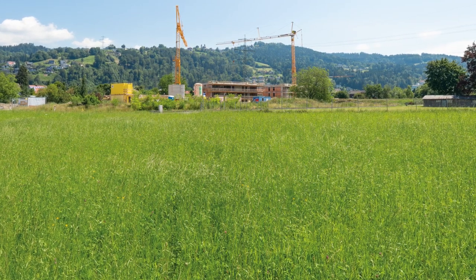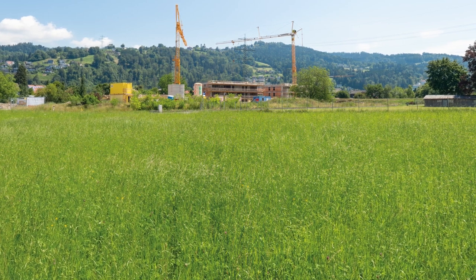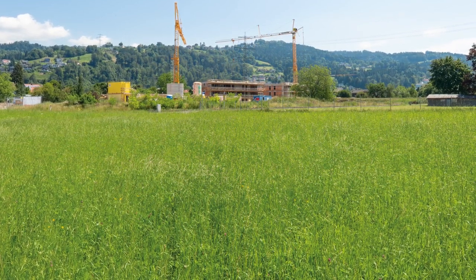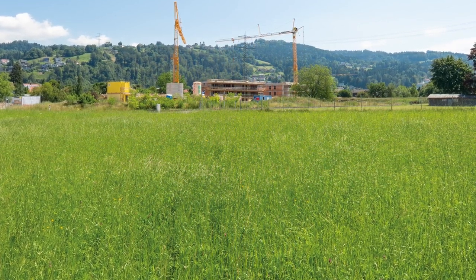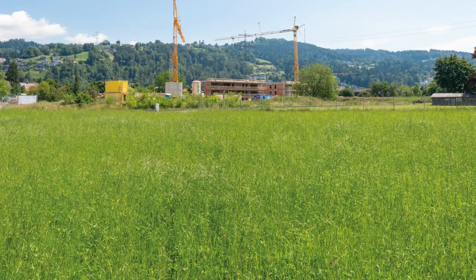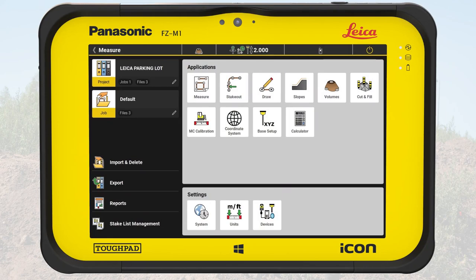In this exercise, we are on an open field where a parking lot in front of a shop is planned. As part of the preparation of the construction site, the field needs to be leveled out. For this task, we will use the application Volumes to survey the surface and calculate the volume for estimation and for progress tracking.